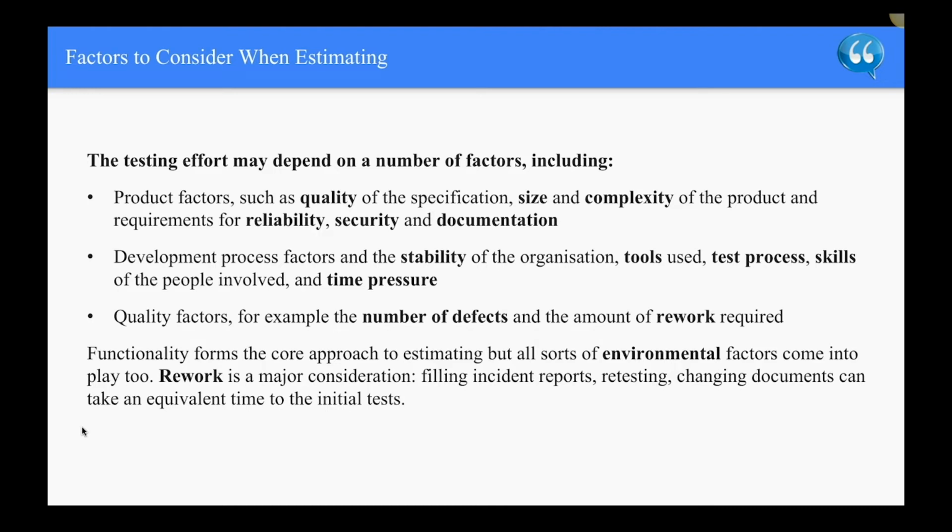So functionality forms the core approach to estimating, but all sorts of environmental factors come into play too. So rework is a major consideration. Filling incident reports, retesting, changing documents can take an equivalent time to the initial tests.